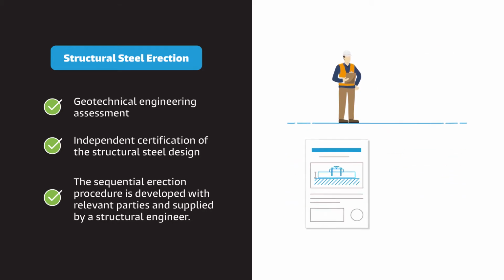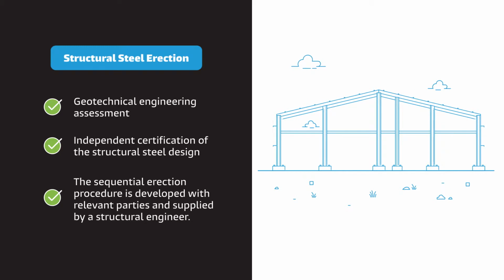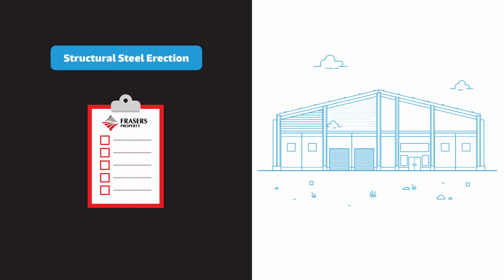Further information on ground bearing capacity and concrete strength requirements must be provided by a competent engineer. Once work is approved to go ahead, the remainder of the checklist must be completed daily for work to continue. This will be completed by FPA.